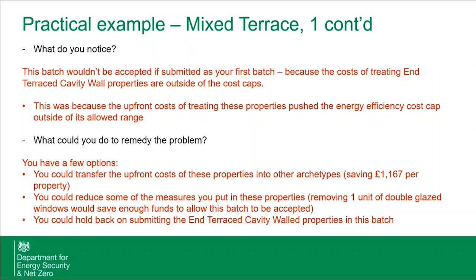But to enable area-based delivery, it might be worth waiting 1 or 2 weeks until you get other homes, a different batch you can submit in, so you can submit that as one batch, because we only green light the delivery of the homes that you submit through a batch. So breaking that into 2 has its own challenges, and we want to make it as easy for you as possible.